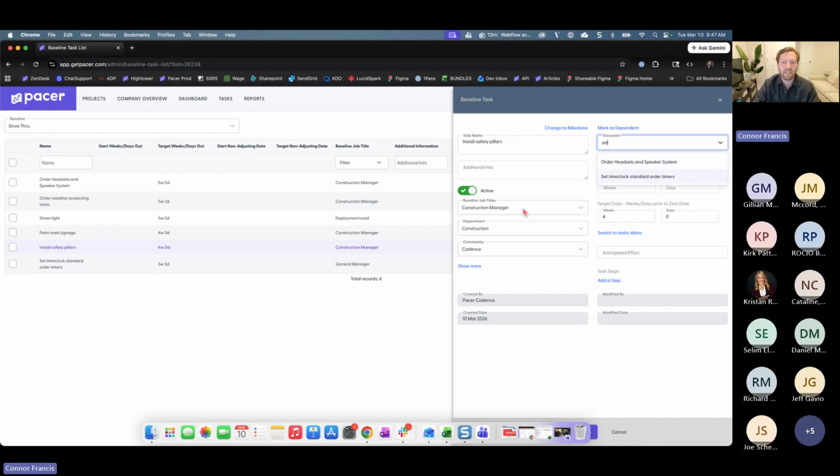You also have to keep in mind that this little bar here is called successor. So if you're looking for a prerequisite, it's only going to populate tasks that come before or on that day. So you just have to make sure that the tasks you're looking to connect are already in that order of target date sequence, so the prerequisite can be completed before the dependency.